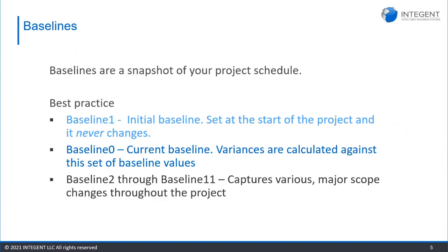So, jumping straight into our change management. For a lot of what we're going to go through today, we are going to assume that all projects have already been started. They have already been scoped. They have already begun work. And whether your project is tracked with a fixed work method, meaning you have a number of hours you have to adhere to, or a fixed duration method, which means it's more of a calendar, dates and deadline kind of approach that you track to, these change management practices will be able to help you with either one of those ways, whether it's a straight path or a blend of how you have set up your project initially.